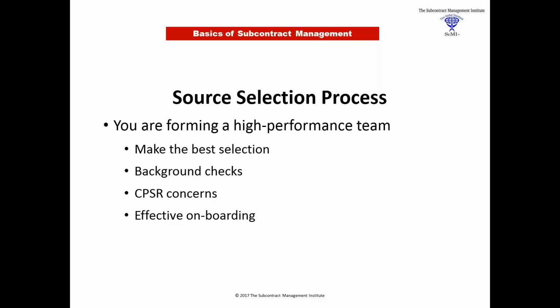And then the last bullet here is like any team development. How do you bring members onto the team? Well, if you're working in your company and you're trying to get somebody to help out with a new project and you're picking people from different departments, you need to make sure that they're brought on board and fully familiarized with the project. In fact, they understand the work breakdown structure. They understand globally the work breakdown structure, and they understand what portion of that is theirs. They understand how the interface controls are going to work, how what they make must fit into something somebody else is making.